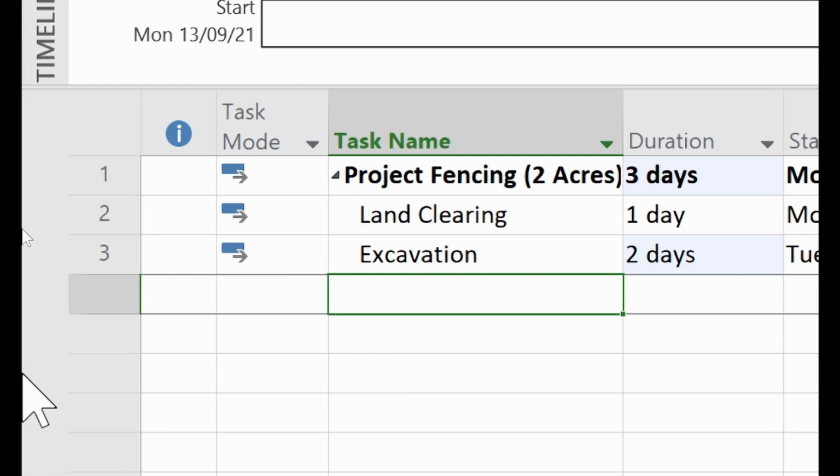So I was asking, the row 3 activity. The reason for putting 2 as the predecessor is that after land clearing, the excavation will come. That is why we are putting the 2. That's the reason and the only reason here. And then the row 2, similarly the same is the 2 you have here. That 2 is telling the system that the task on row 2 is a predecessor of this particular task. So this particular task is excavation, and its predecessor is land clearing.